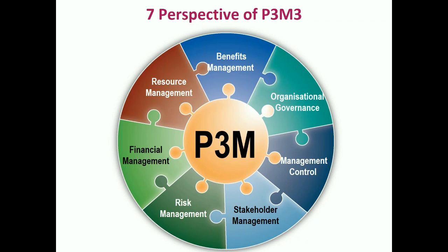The resource management, widely recognized as having 4 separate elements of resource management, and that obviously is excluding the finances. The first and most widely recognized would be the HR function. Who are the staff in the program teams, the project teams? The second critical resource here is information. And how does that information flow? How is it managed? The third element of resource management is the infrastructure piece, and that's both the IT infrastructure to support the information management, but also the physical infrastructure for how you're going to run the program.